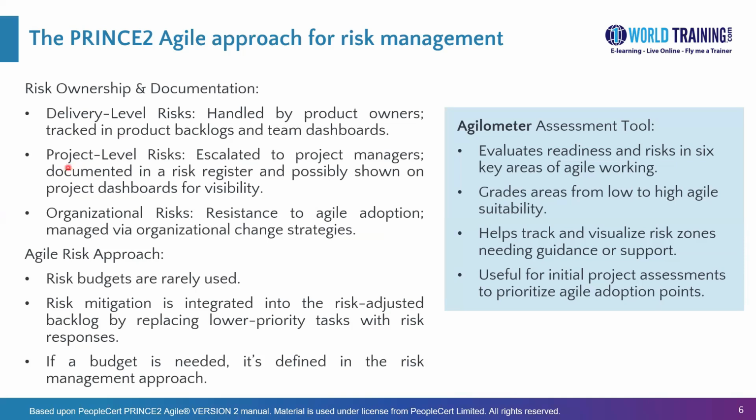Project level risks are with the project managers. They are informed about them through any source, and the project manager is supposed to document them in a risk register, and they will highlight some of them or summarize them in the project dashboard periodically.